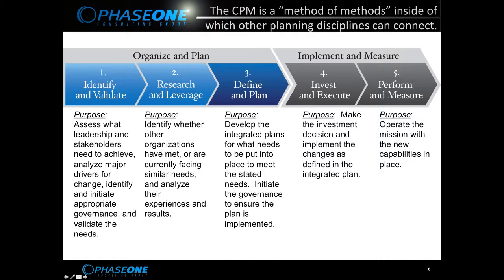Now, step 2 is called research and leverage. Step 2 is really designed towards understanding whether or not this problem has been solved in other places previously. So for step 2, we really identify other organizations that have met or are currently facing similar needs, and we analyze their experiences and their results.